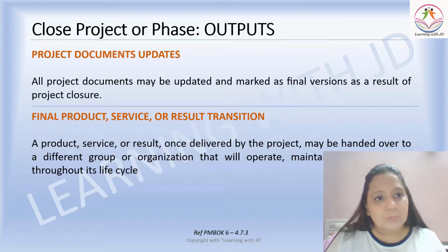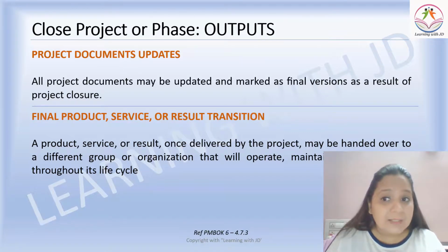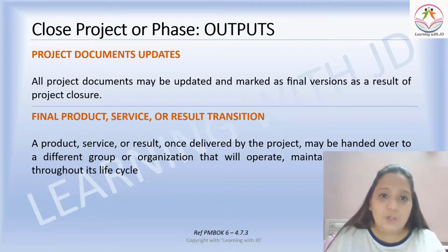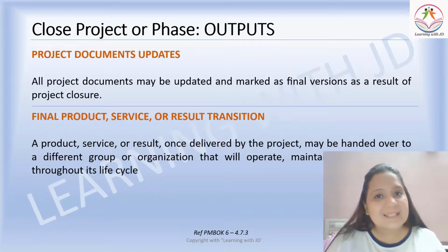Now let's see what the outputs are. The project documents get updated. Yes, all the project documents may be updated. Whatever lessons learned you've entered are part of the project document update. At this point of time, will you ever have your project management plan updated? No, because the closure of the project is done. There's no other management that you now need to do. But the project documents get updated because the lessons learned are a part of the project documents.